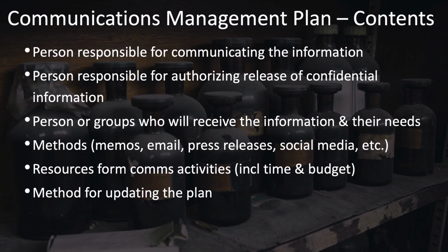Is this something that is baselined and part of your normal change control process? Or is there some less formal method for updating the communications management plan? And are there some parts of it that need formal change control and other parts that don't? This is what you can and should specify in the communications management plan.